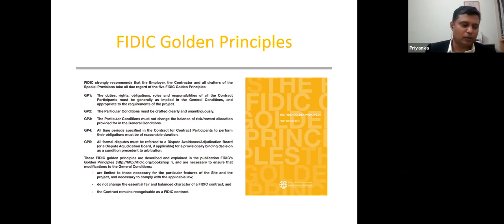provisions. Now, in the FIDIC terminology, they don't call it the particular conditions anymore. They call it special provisions. Special provision has got two. Number one is for the contract data, special provision A. Special provision B is for the so-called particular conditions of contract.